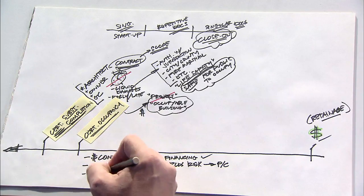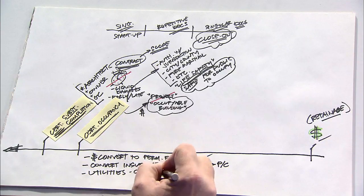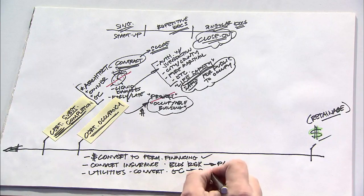Oftentimes, at this stage of the game, utilities are also converted from being in the name of the general contractor to being in the name of the owner.